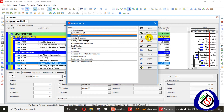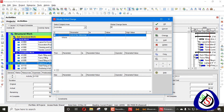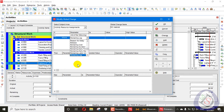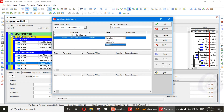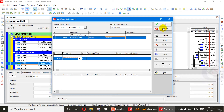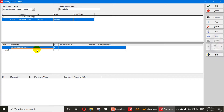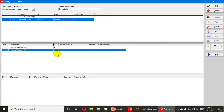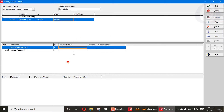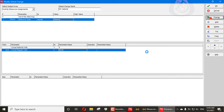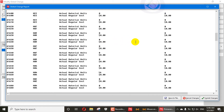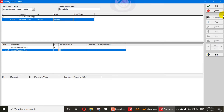Add another new global change named 'GC Material'. Material resources are also available in this project, so they need to be removed. Set the resource type to Material and add a minimum of two parameters: Actual Material Units and Actual Regular Cost, setting each custom value to zero. Apply the change, which updates all material costs. Commit the changes, don't save the log, and press OK.